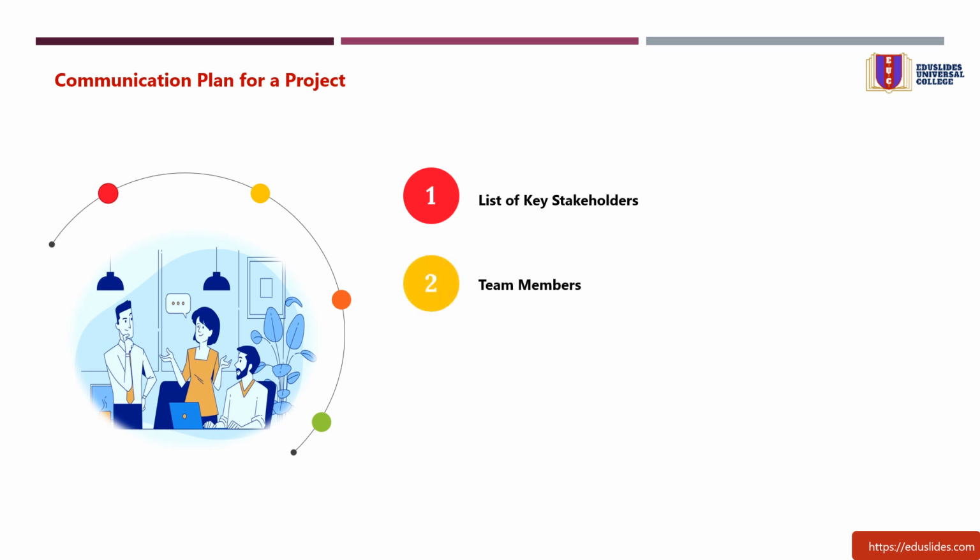Team members. List the principal team members of your project team with their roles. This information is useful for those who are new or not familiar with the project. This will help you identify who is responsible for communicating deliverables, leading strategic conversations, and how you'll handle technical discussions between stakeholders. Communication methods. Describe the main communication channels and methods you will use to reach stakeholders.